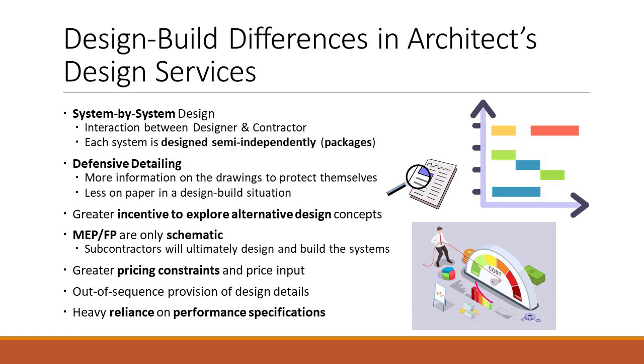I design the foundation system. I design the steel support system. I design the electrical system. Those can be designed, like I said, semi-independently here. You can say, I've got a team that's only working on electrical. Now, it's ultimately got to be integrated with the plumbing, and there's a coordination issue and everything else. But being able to do the projects in chunks makes the project be done faster.